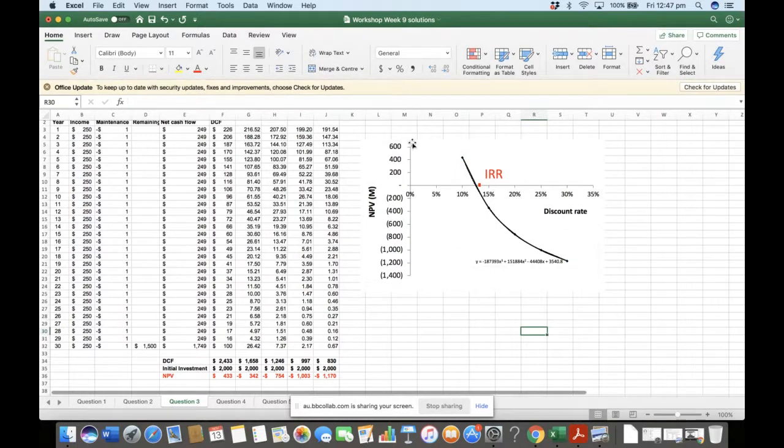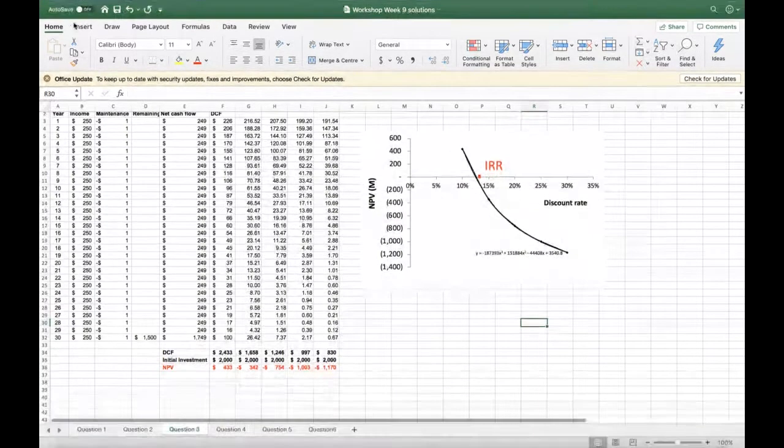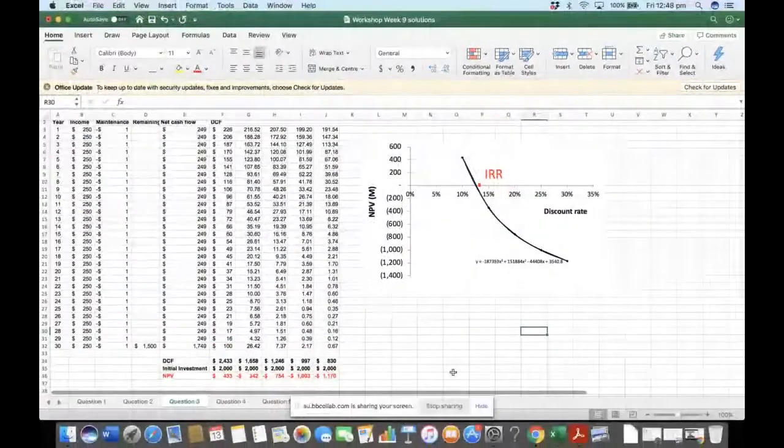And we know the y value, right? So we want to find the x value. So we want to find this value when y, or your net present value, is equal to 0. So just put 0 in this equation and use your calculator to find the value of x, and the value of x that fits between 10% to 15% will be your desired x value. And I think even I got somewhere around 12.34 or something like that. So it's approximately 12.3% for your IRR. Okay, let's get back to our main slides.